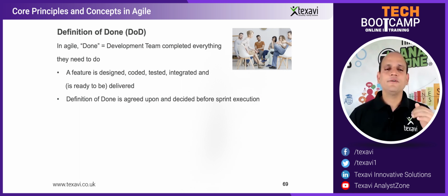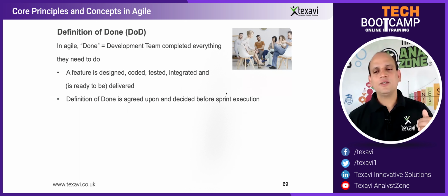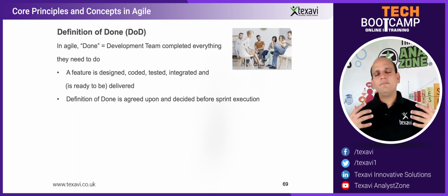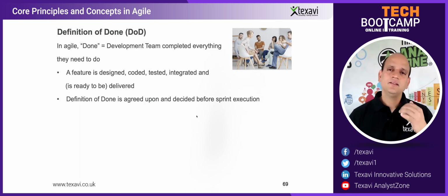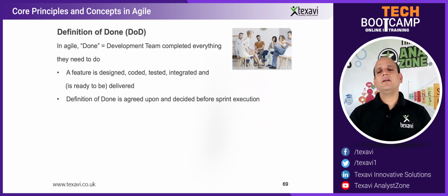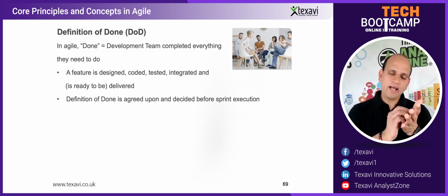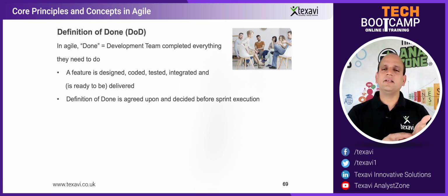And that definition of done, unless you agree, they discuss as a team, within the team, even before we start the project. That's important. Even before we actually start the sprint, we would have the definition of done discussed. And then obviously there are a lot of discussions, a lot of different points come through, and all the team members put forth their opinions. Then there's an agreement, consensus is reached, and that would be put in black and white, saying that this is the definition of done.